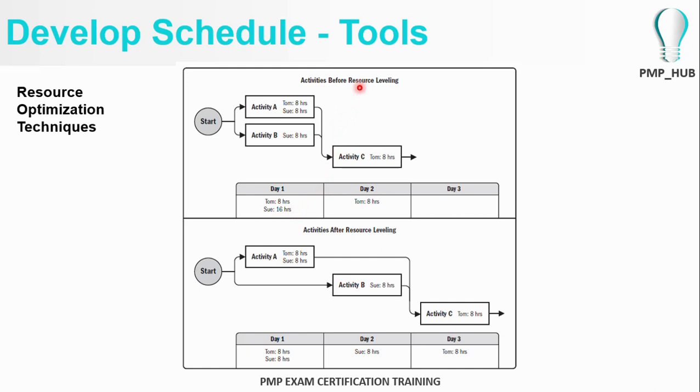So the technique that we can do is resource leveling. Under resource leveling, you allow the project timeline to get pushed out since there is no other option. So in day 1, we can ask Sue to work 8 hours and finish activity A. And in day 2, we can ask Sue to finish activity B, and activity C needs to push back since activity C requires output of B, and it can be conducted in day number 3.